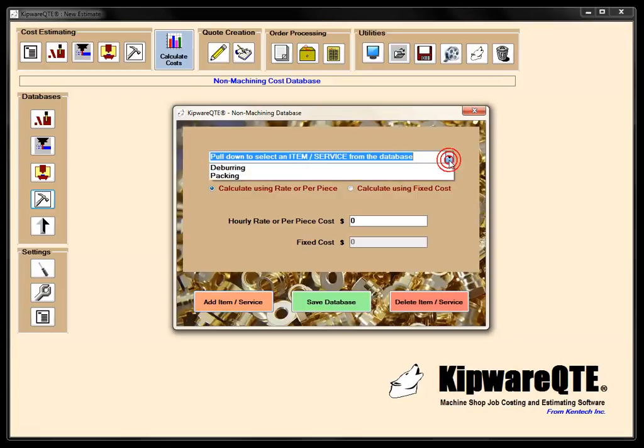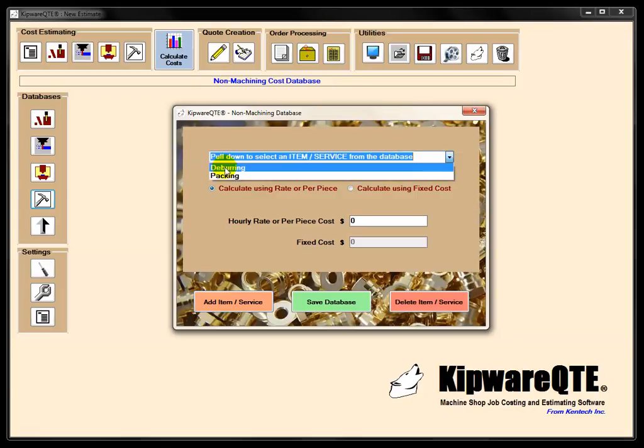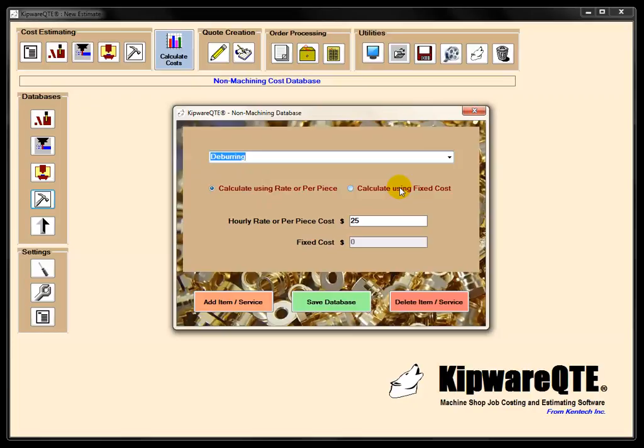So if we take a look at some things that we have in here, we have deburring, and you can see there's two ways that we can calculate the cost. One is an hourly rate or a per-piece cost, or we can use a fixed cost.